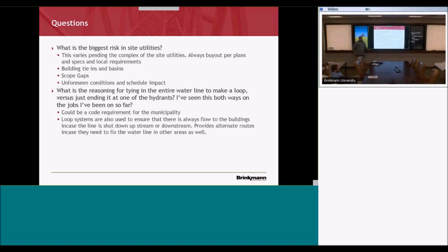That's the risk. You hear Brian talk about it all the time. Our job is to manage our risk. We're putting that risk in their hands. If they hit it, we want them to have to pay for it, not us. If they don't keep up on their markings, if they're gone for a week and somebody ripped out their flag, that's on them, it's not on us.